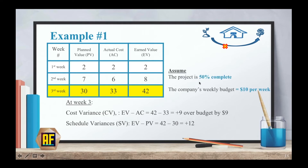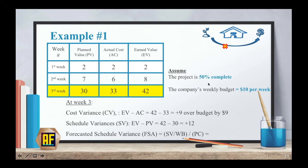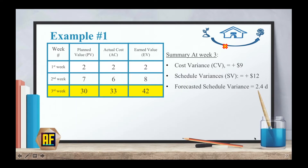We assumed the project is 50% complete, and the company's weekly budget is $10 per week. Now we can calculate the forecasted schedule variance, the FSA, which is schedule variance (12) over the weekly budget ($10), over the percentage complete of the project: 12 over 10 over 0.5 gives us 2.4 days. Remember that the answer here is in days.